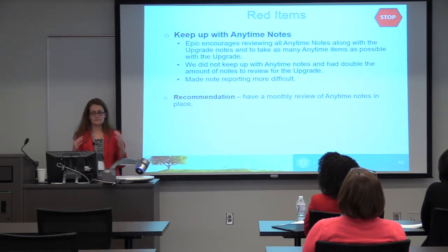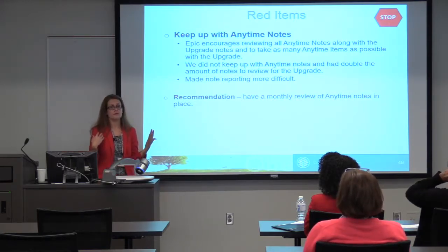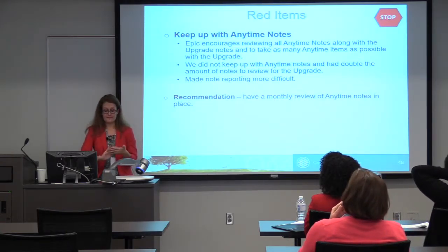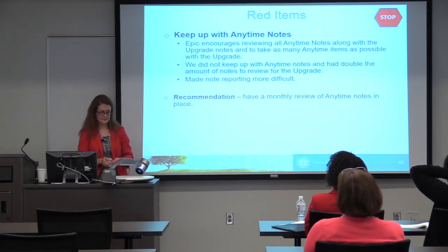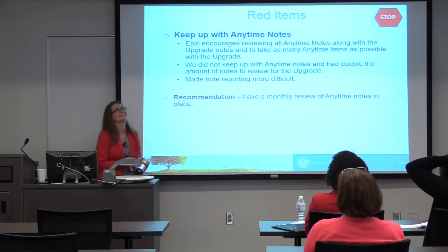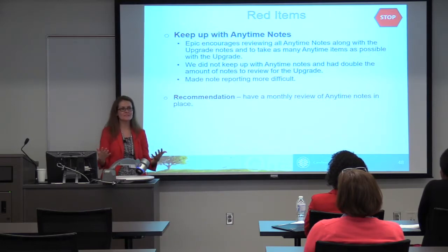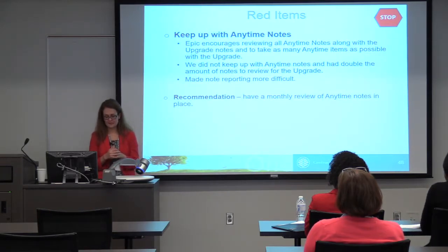So I definitely recommend that you have some type of review frequency, whether that is monthly, every other month, or every quarter. I recommend you have that in place. I will say that we don't have that in place yet for our next upgrade. I recommend it, but we're not doing it yet. It's just so hard right now because we're still in that implementation mode and we just can't focus on this stuff. Hopefully we will have it after our next upgrade, once our implementations are done. But definitely that caused us a lot of heartburn and more work on our end just to even keep up with it.